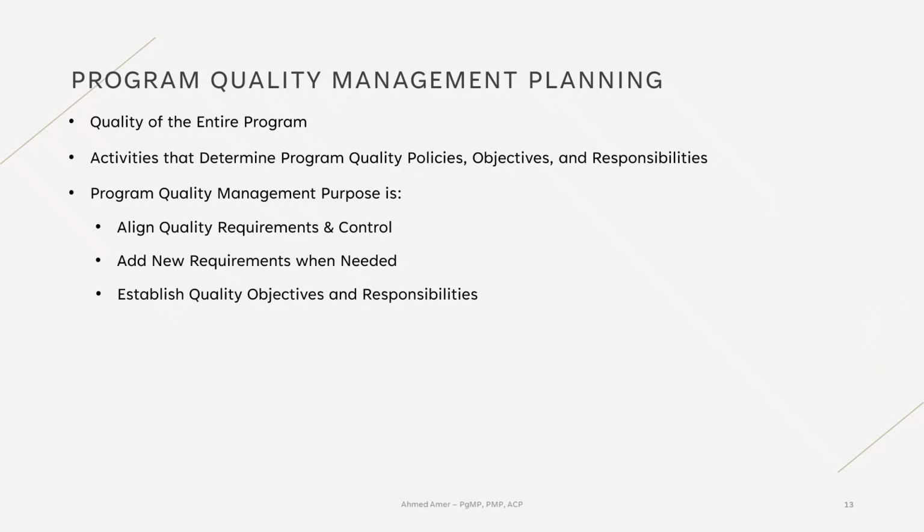Program management is responsible for planning the appropriate quality assurance criteria across the entire program lifecycle, which often extends beyond the timelines of individual components. As the program evolves, new quality control tools, activities, or techniques may be introduced when necessary. For example, if new laws are enacted during the program or if new components are added, the program may need updated inspection methods or additional quality controls to remain compliant and effective. When initiating the program, the cost of meeting the required level of quality should be evaluated and included in the business plan.